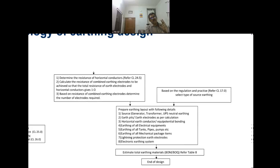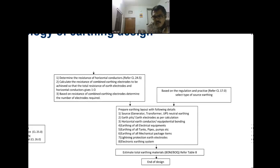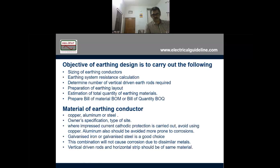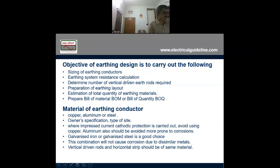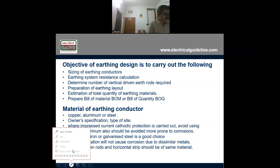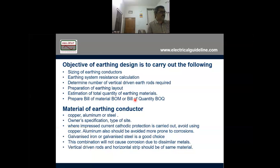The final deliverables are: first, we have to prepare the earthing calculation. But the site guy needs two things — the earthing layout and the bill of quantity. The supply chain guys need the bill of quantity so they can order items. So the objectives of earthing design are: sizing the earthing conductor, determining the earthing system resistance, determining the number of vertical and horizontal rods, preparing a layout, estimating total quantity, and preparing the bill of material.